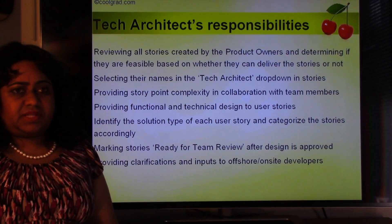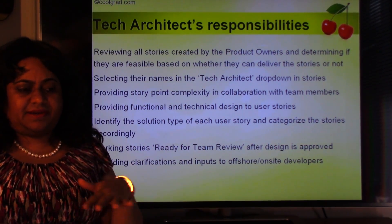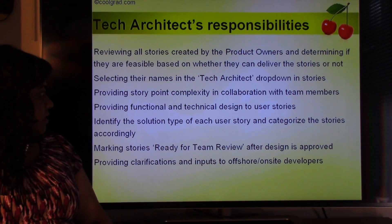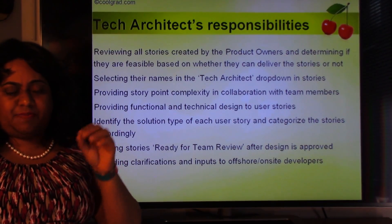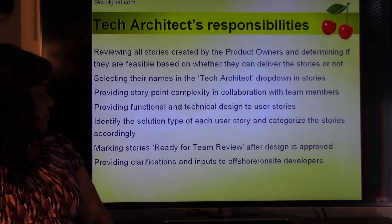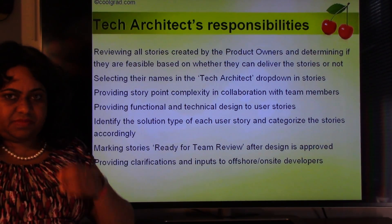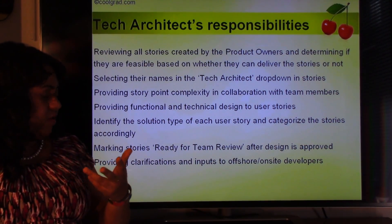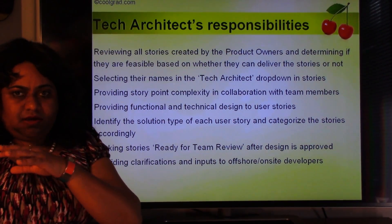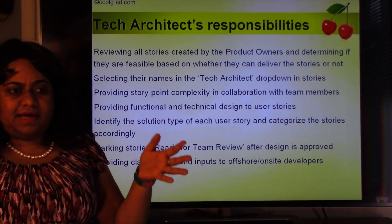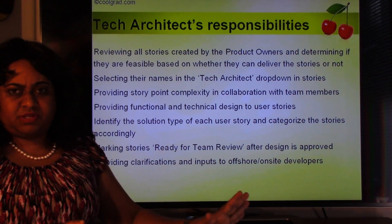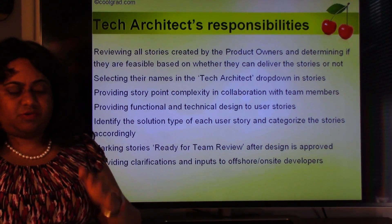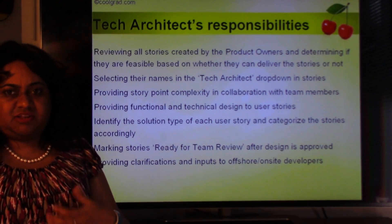Technical Architect responsibilities: A technical architect usually works at the database level and higher, dealing with functional and technical dependencies, and linking systems to each other. In the user story, there is a 'Technical Architect in Charge' dropdown where they pick their name. They provide functional and technical design for user stories, designing how each story must be solutioned. Once all details are populated during grooming — business requirements, acceptance criteria, system-level specifications, and architectural details — the technical architect says it is ready for team review. After team review is done, the BSA marks it 'team review done.' The technical architect provides clarifications on all technical issues to the resources.